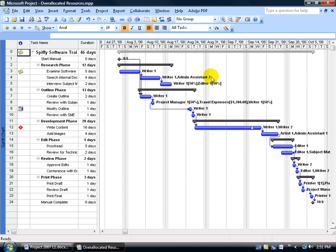So if I cut it back to 50% when I assign the administrative assistant, they're working 2 hours. If I take this part-time person and increase their percentage from 100% to 200%, remember they're part-time at 4 hours — they go from 4 to 8. Anything over 4 hours, they're over-allocated. And anything over 8 hours for full-time resources — 8.5, 10 — they're over-allocated.